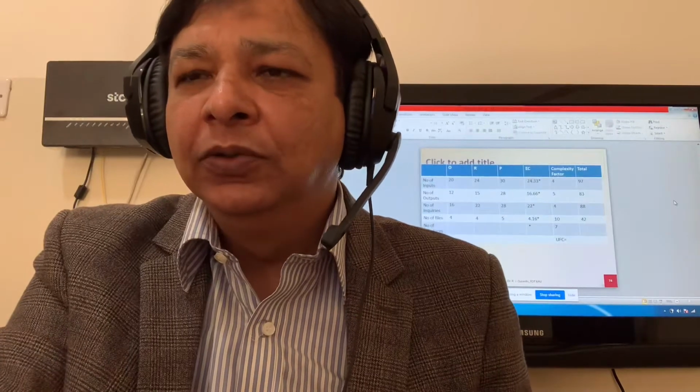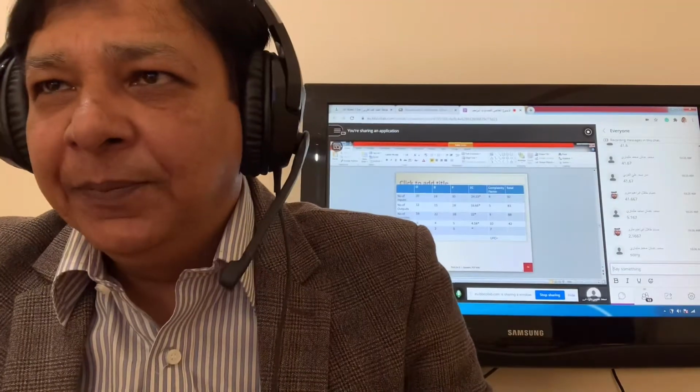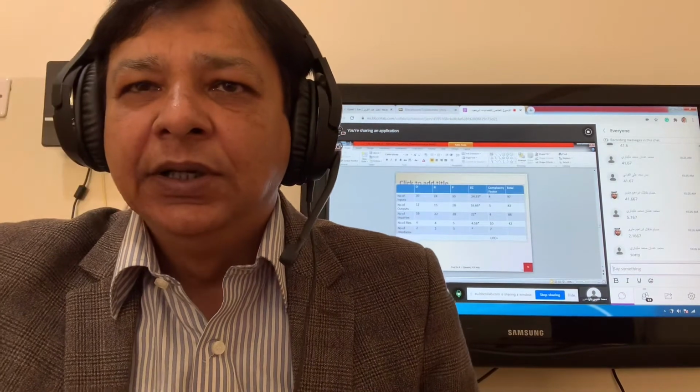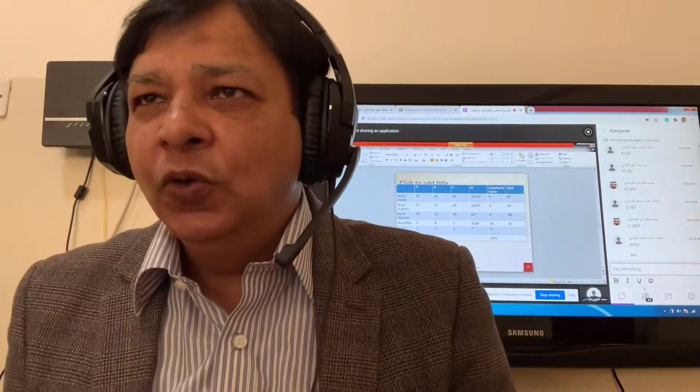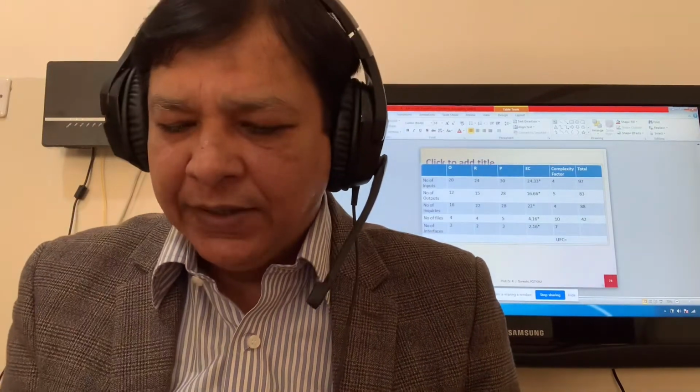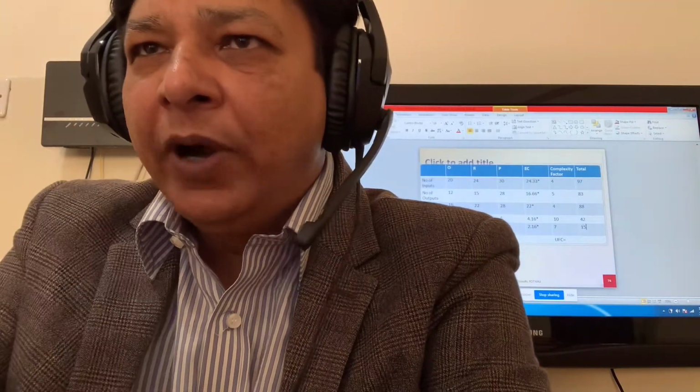We go back to interfaces: 2, 2, 3. What is the EC value? 2 multiplied by 4, 8. 8 plus 2, 10. 10 plus 3, 13. 13 divided by 6, so it's 2.16. 2.16 multiplied by 7 is about 15. So we can write 15 because it is less than 0.5.